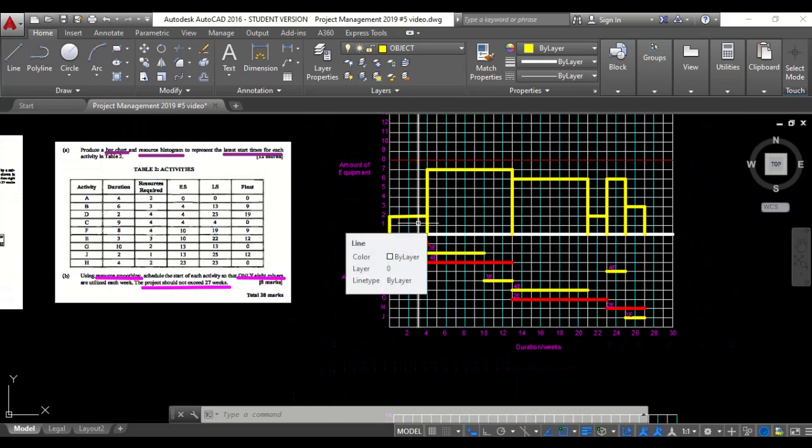If you saw another way where you could go ahead and arrange or adjust the activities within the constraint and ensuring that no predecessor falls before an activity it shouldn't, then you can go right ahead, because as long as you meet all the criteria, your answer will be accurate.